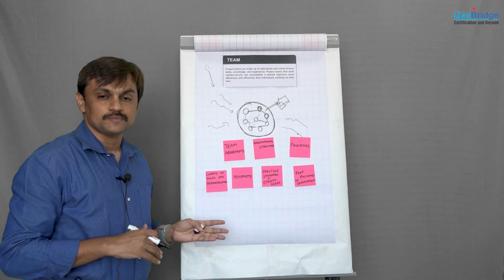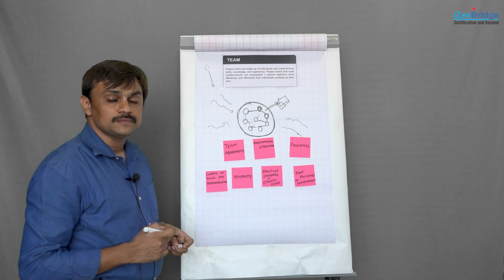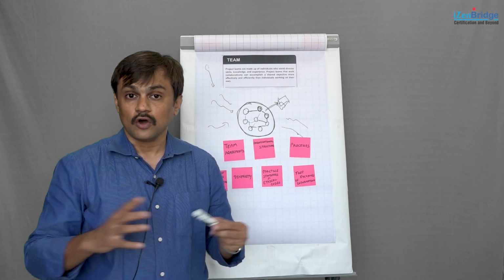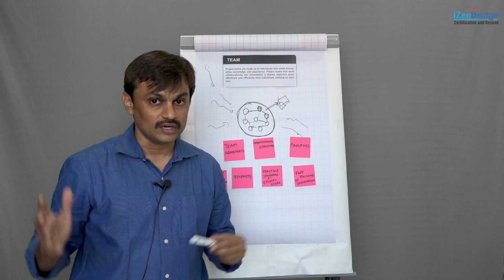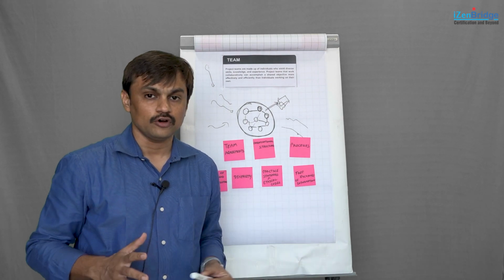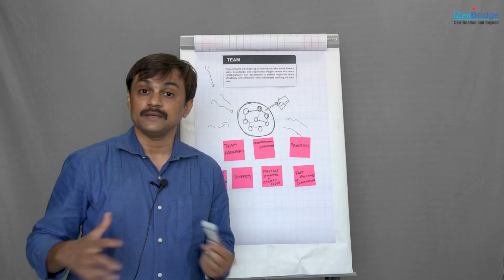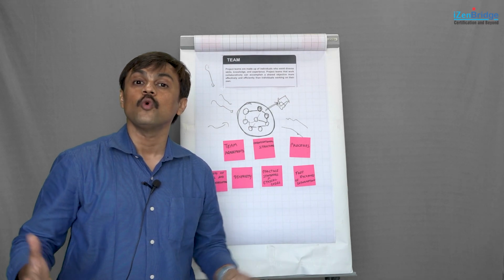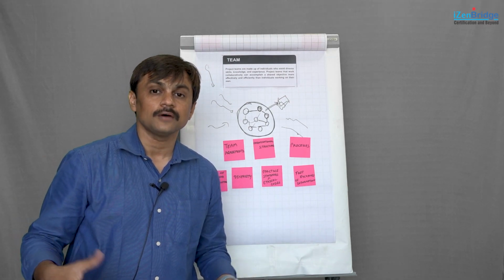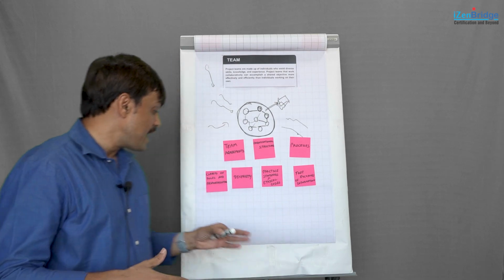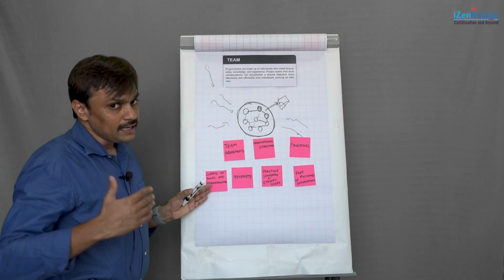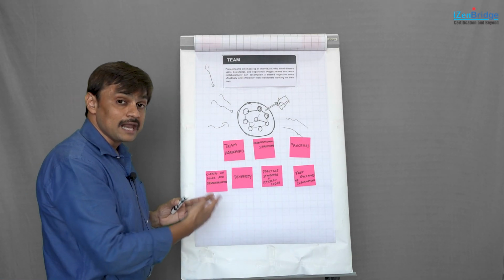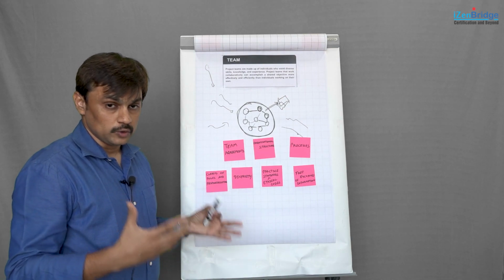People should know who is expected to do what. Many times these roles and responsibilities are also explained with the help of authority, accountability and responsibility. Authority is about who is authorized to do what, what kind of decision can be made by whom. That clarity is authority. Responsibility and accountability many times confuse people. Accountability is all about who owns the outcome, whereas responsibility is all about who is executing and getting things done. So, having clarity of roles and responsibility, and again these are not one-time clarities, they can evolve over a period of time, helps us in creating a better collaborative local culture.